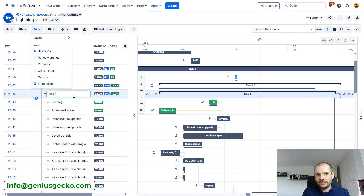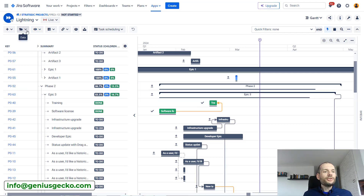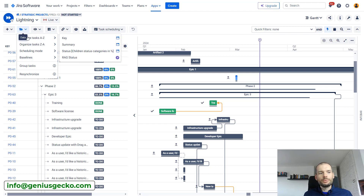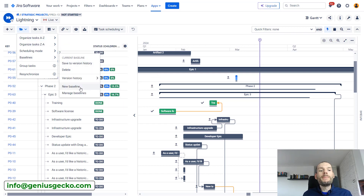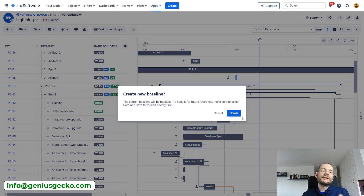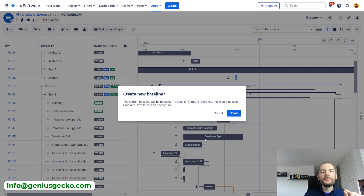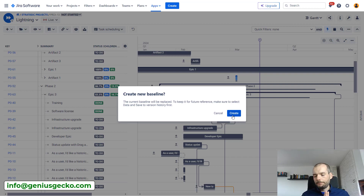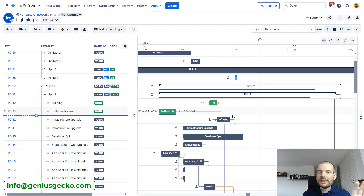Fortunately, Big Picture has now added support for multiple baselines, which I think is pretty great. After you create your plan, you can go to Baselines and click New Baseline. I already have baselines, but I'll click it anyway. It will tell me it will override the current baseline — meaning the values in the baseline start date and baseline end date custom fields on the issue level will be overwritten. So on the Jira level, there is still a single current baseline stored in those two fields.